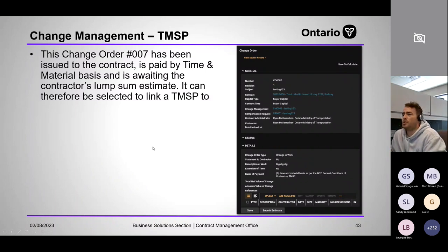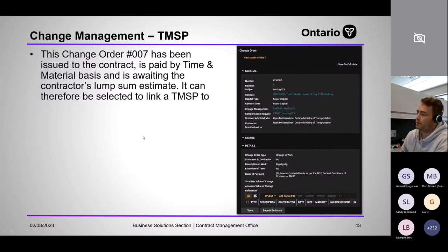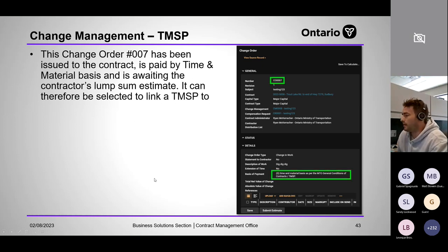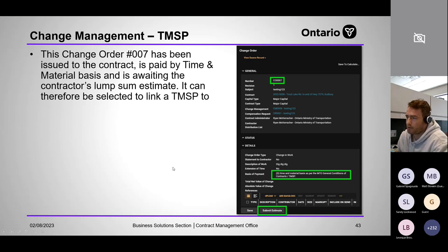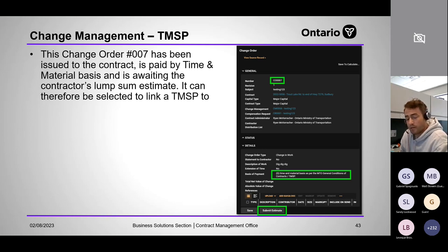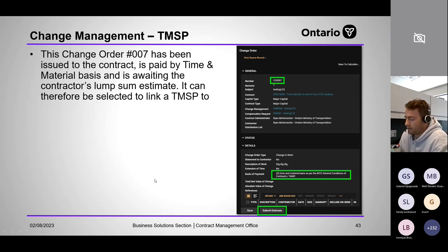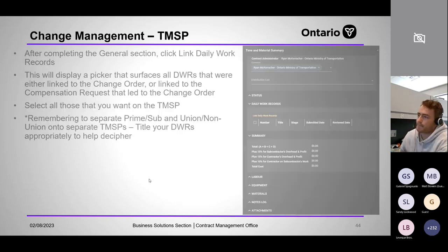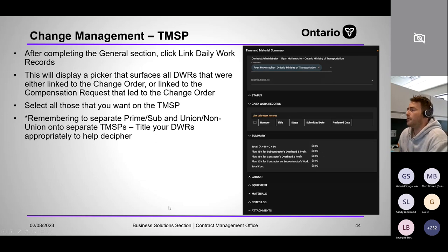Here's an example: Change Order 7 is issued to the contractor, paid by T&M — you can see the basis of payment as Time and Material per the general conditions of contract. Submit your estimate as a lump sum — when a T&M change order is first issued, you don't have the final exact cost or TMSPs, just your estimate. Support it with documentation and comments. After completing the general section, click Link Daily Work Records.